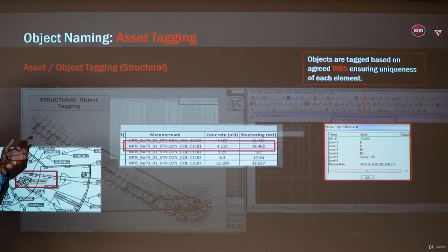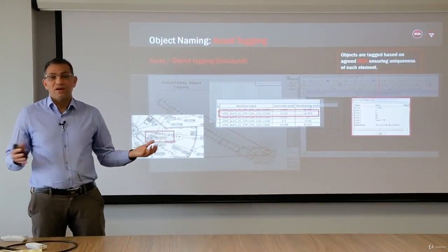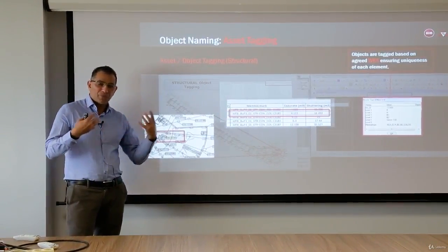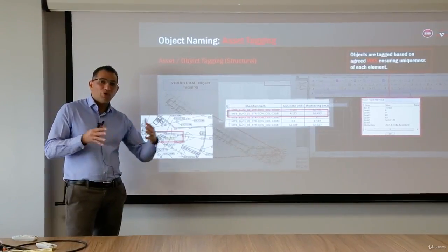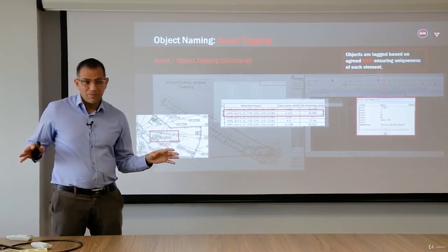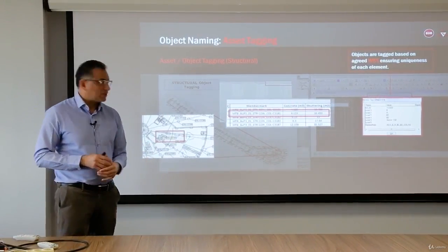Because unless we create a unique object identifier between the different assets and the other systems, we will not be able to integrate BIM properly with cost, with time, with quantity, with quality, with many other applications. And this jeopardizes our intention to have a complete and integrated BIM platform to run the BIM process effectively for all the stakeholders during construction and beyond construction.